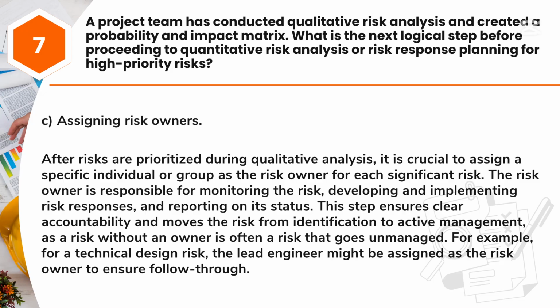Answer: C. Assigning risk owners. After risks are prioritized during qualitative analysis, it is crucial to assign a specific individual or group as the risk owner for each significant risk. The risk owner is responsible for monitoring the risk, developing and implementing risk responses, and reporting on its status.